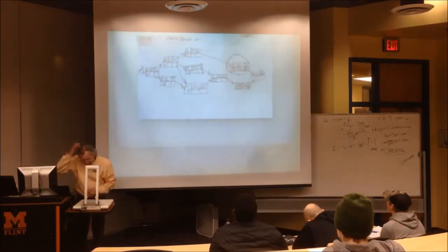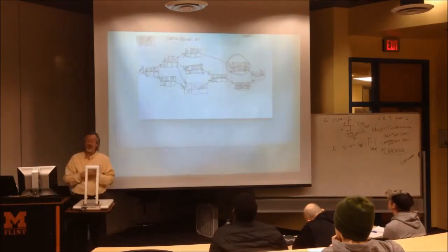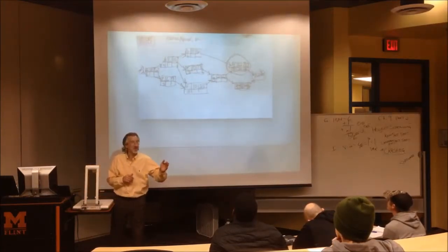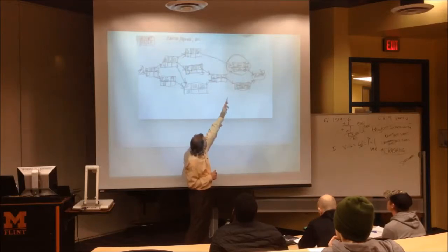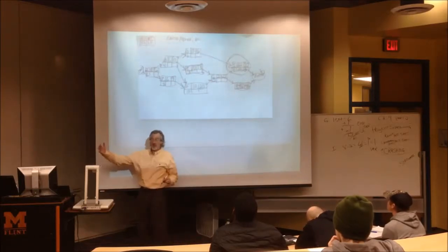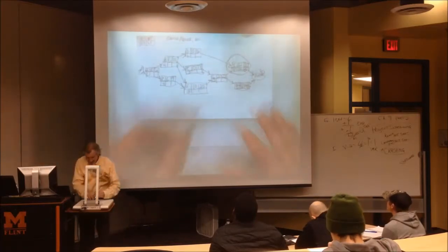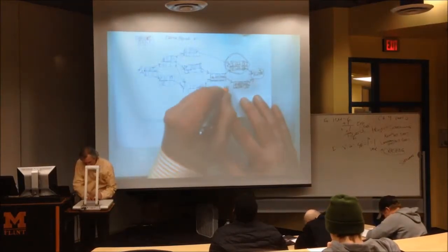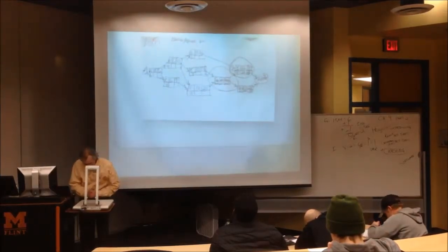All right, G could finish as late as, I've heard some numbers here. Give me it again, with confidence. 22, no 24s. Look at where G's coming from, I got an earliest finish 22, bottom left-hand corner box, and a 24 on H. So you had two numbers there. When you're going backwards, it's the smaller number, not the biggest. It's the opposite. So we're going with a 22. Subtract 2, 20. We just identified. Thank you. Critical activity.